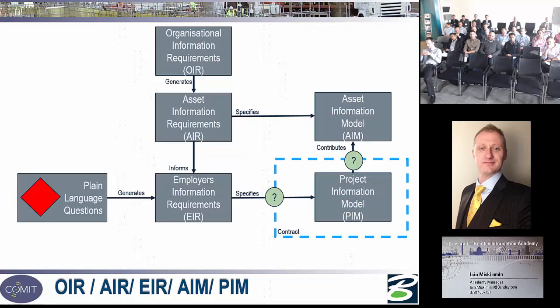But having said that, nobody's really asked the maintenance and the operations guys what they need to know yet. And that's why this has always been a bit of a problem. We've all been very good at delivering information. Oh, it's this high, this wide, this deep, and it's painted this lovely colour. I couldn't give a damn. I want to know how to isolate it and what oil I put in it every time I need to maintain it. That's the really important information. So you test the EIRs by the PLQs. These plain language questions, if you can't answer these using this and this, then you're not doing it right.